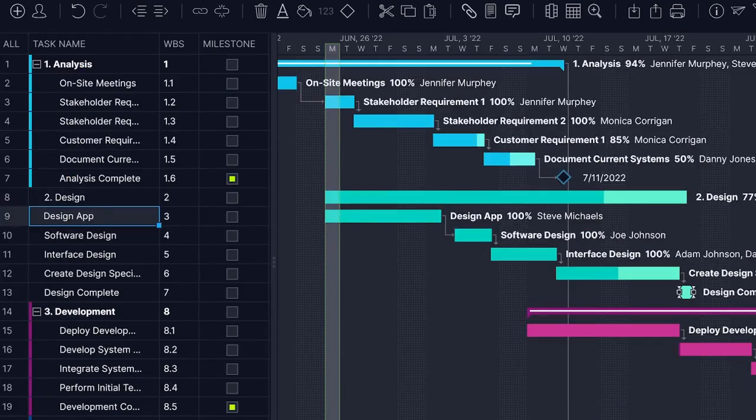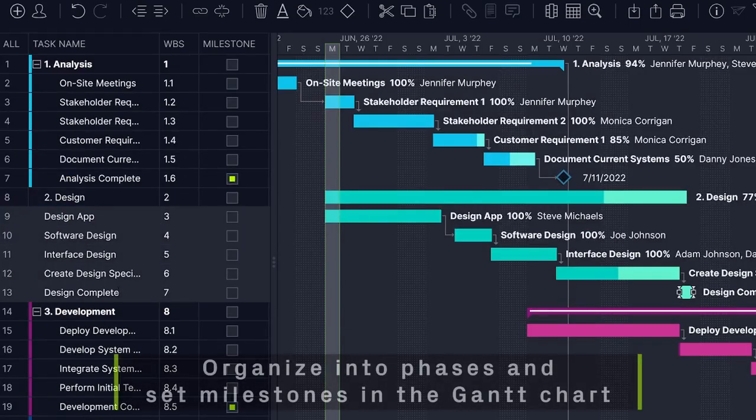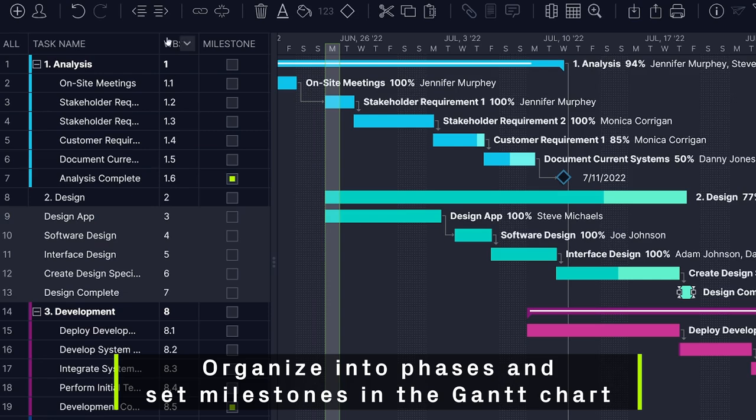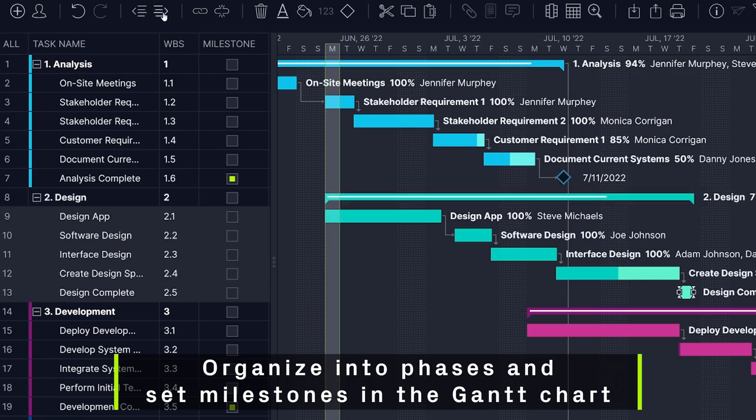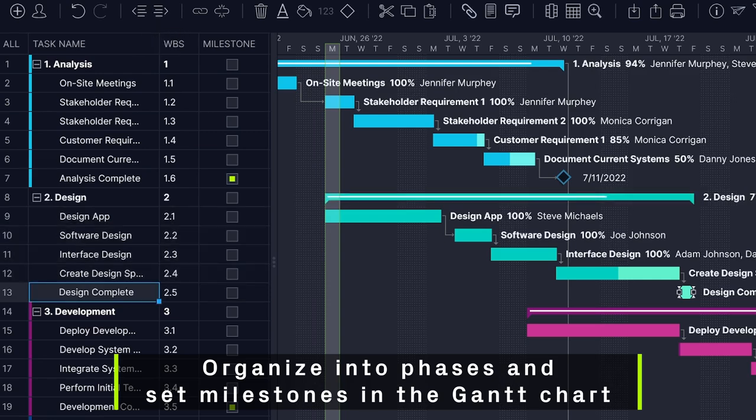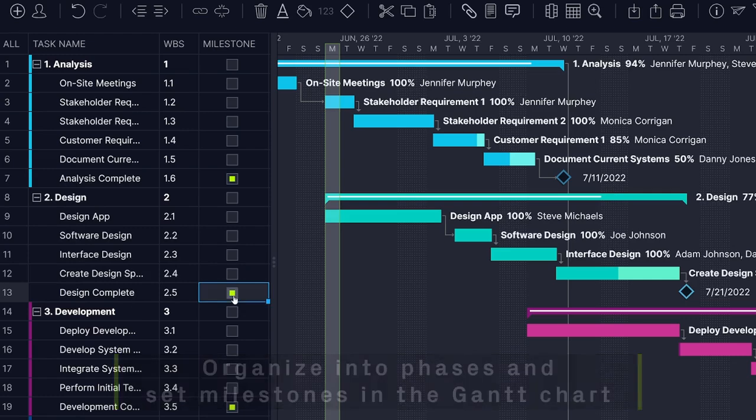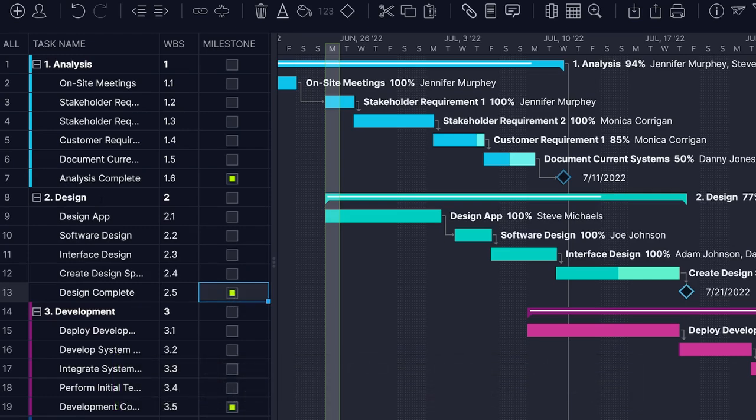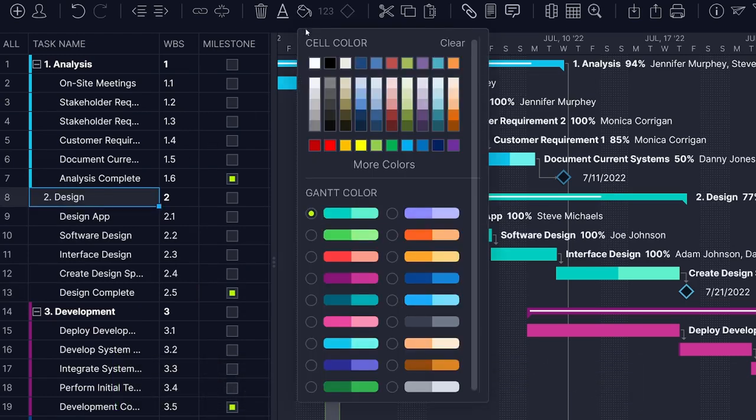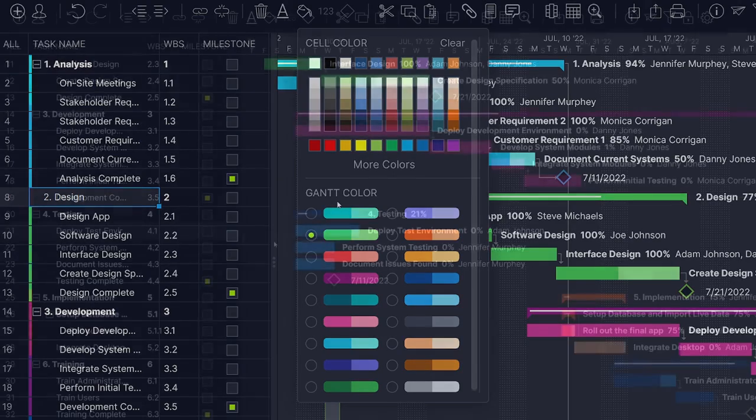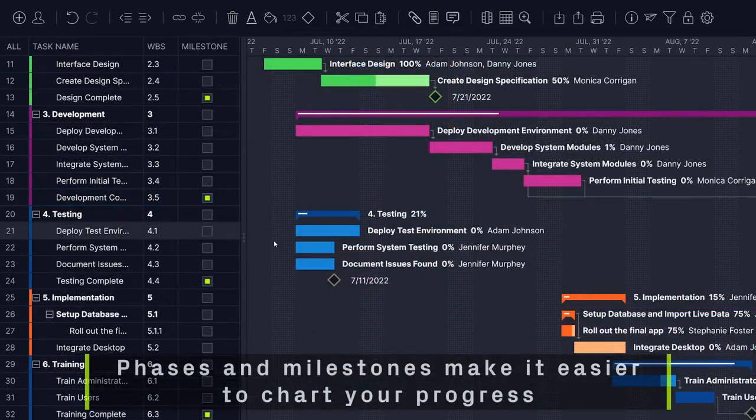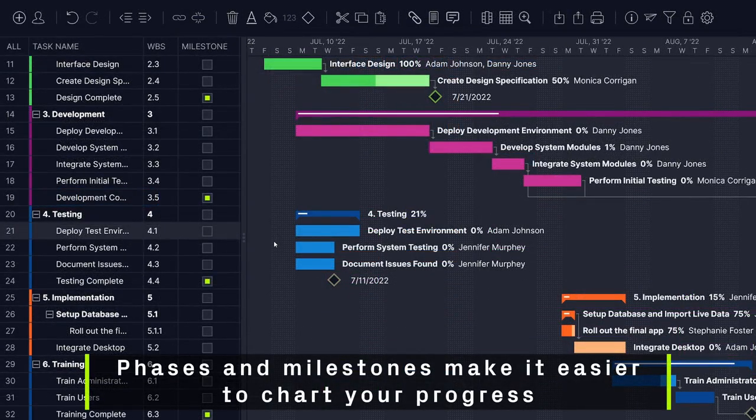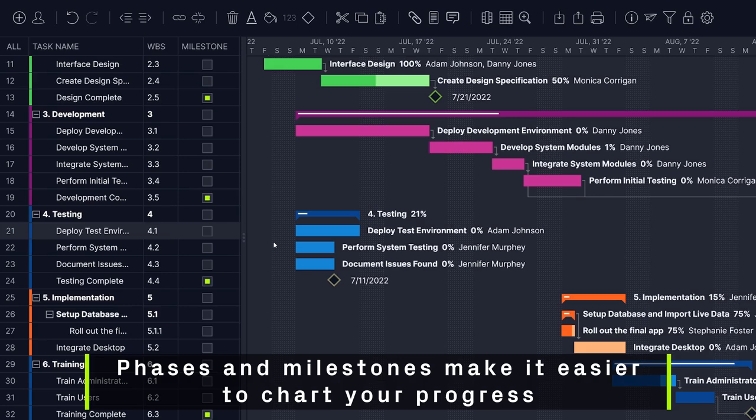Now that you've finalized your task list, organize them into phases and set milestones in the Gantt chart. You can even choose different colors for each phase, making them easier to identify on the waterfall timeline. Having phases and milestones allows you to break up the work and makes it easy to chart your progress.